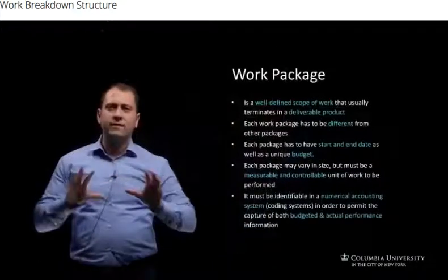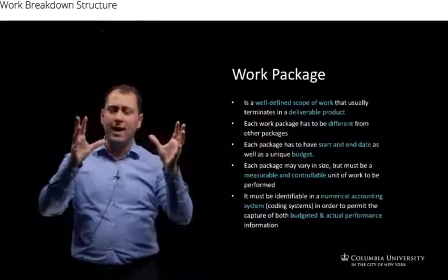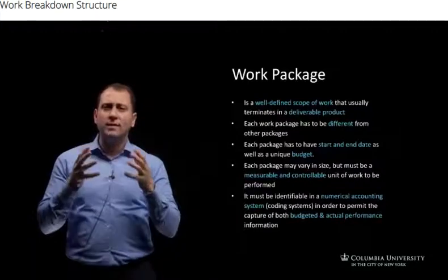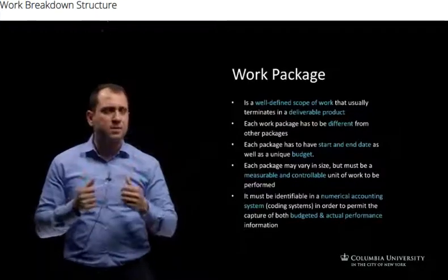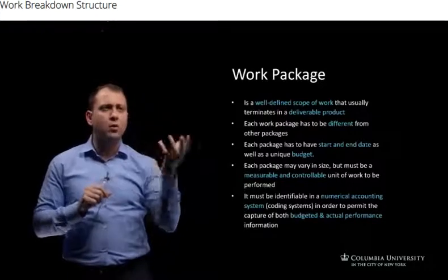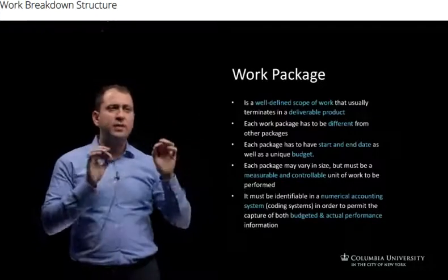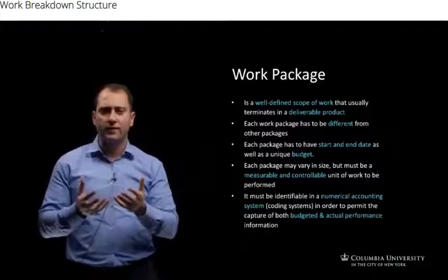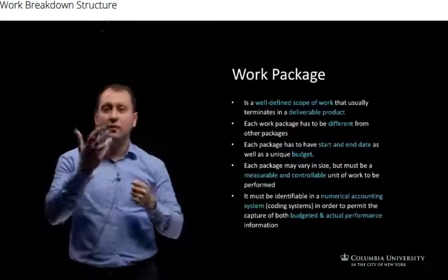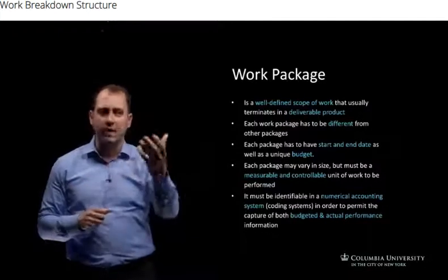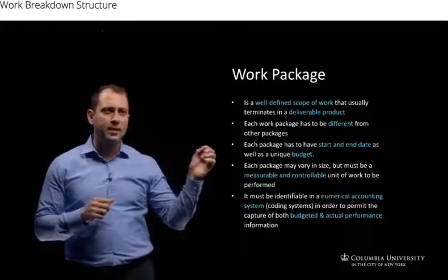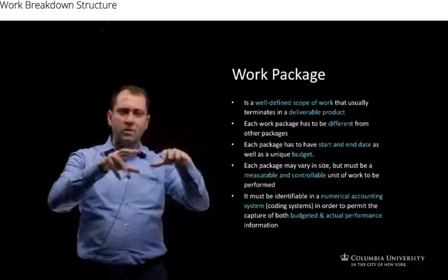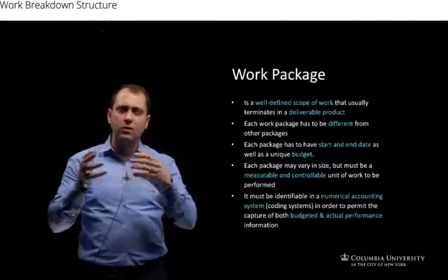So as we noticed from the example of the WBS of that small house, we talked about the work packages. Let's go through the details of what is a work package in more detail. As we saw, one example of a work package has to be a well-defined scope of work and end up with a deliverable, a product, like the east wall, like a foundation, like the excavation of the foundation. And each of the work packages has to be different from each other.